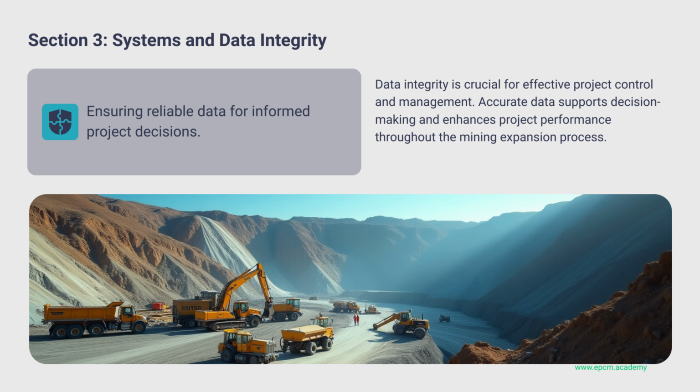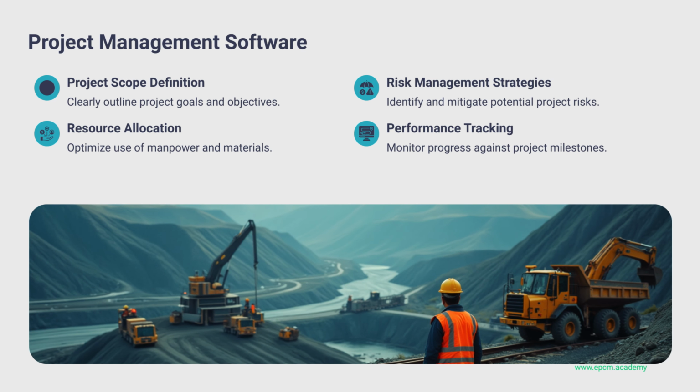And in this mining case study, they specifically recommend using EVM metrics like the Schedule Performance Index, or SPI, and the Cost Performance Index, or CPI. These metrics give you a clear indication of whether you're on track, ahead or behind on both schedule and cost. Okay, so if the SPI is less than 1, you're behind schedule, and if the CPI is less than 1, you're over budget. You got it.